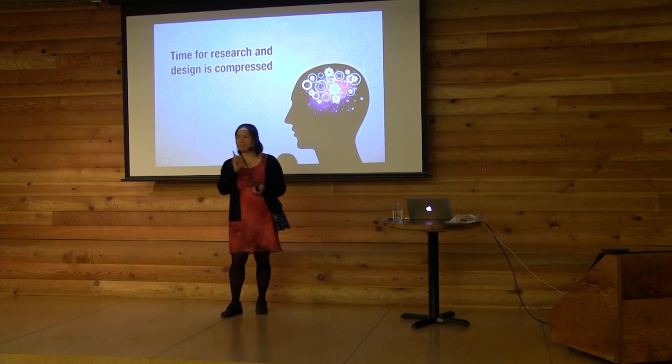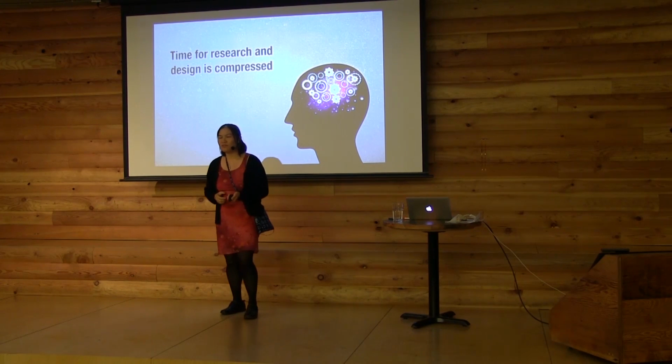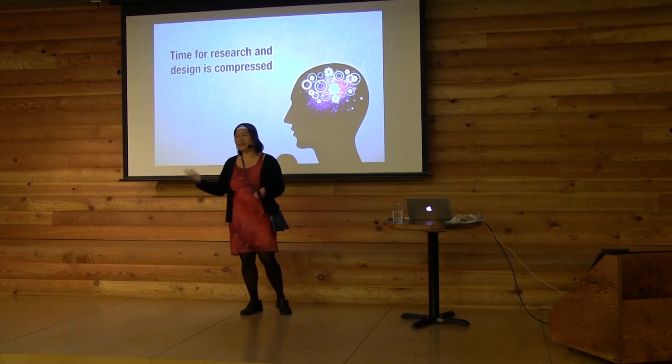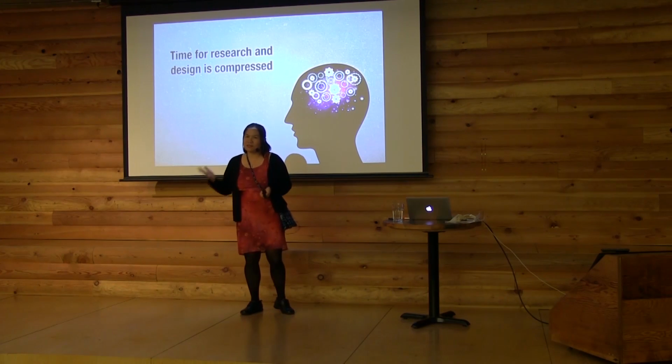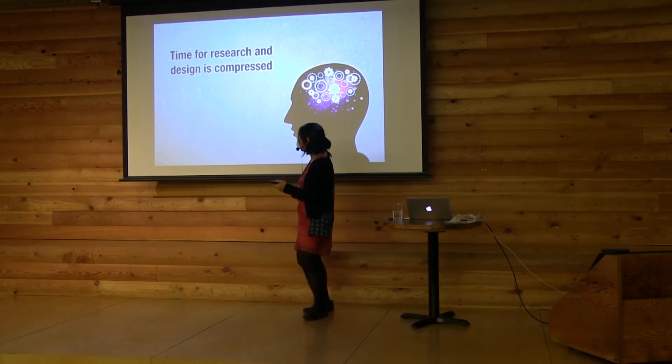Okay, I've thought of an answer, which is what I would do is, the first design that looks decent, that's often like halfway through. When I have a design that kind of looks decent, kind of hangs together as a straw man, I'm usually about halfway through my allotted design time, and then I put it out there. And what happens is that people will complain about it, like you realize that there's issues, and then it's a matter of, okay, yeah, we do need to fix these issues. Whose job is it to fix them? It's mine. And I think people learn from experience that spending the right amount of time on it leads to better results. Good question, yeah.